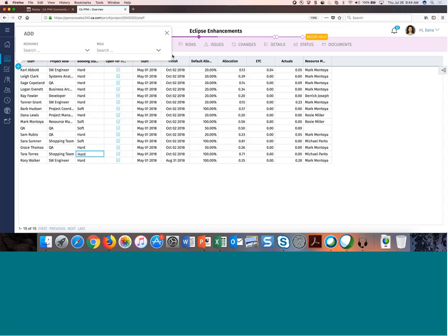Since we're talking more about future capabilities here, team is articulated as a resource from a system perspective. Not only am I staffing a team as a resource, I can assign tasks to teams and enter time for teams, and that flows right through to our cost plans. Since team is a resource, a team becomes an entry in the cost plan. So hopefully that answers your question.